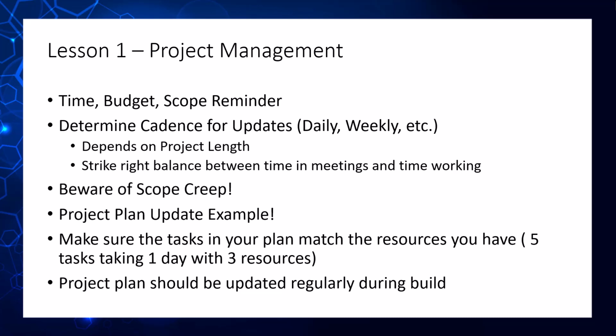Your budget should never be your absolute budget that you can't possibly increase, just because things are always going to happen. If you do get to the point where you don't have the budget to pay for some of the things that are happening, that's where we can look to change scope and maybe remove certain pieces of functionality from the application, which could save time, in terms of now that doesn't have to be developed, and then that will reduce the budget that way.